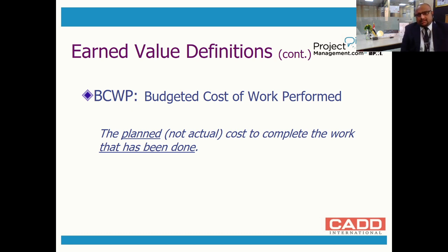One more simple example which makes it a little more clear. I am about to do the flooring for my 4 rooms, which are of equal area. These 4 rooms have to be completed in 4 days with a cost of 4,000 dirhams, which means each day I have to complete 1 room with 1,000 dirhams expense. This is what my plan is.